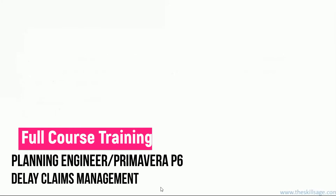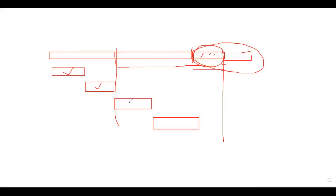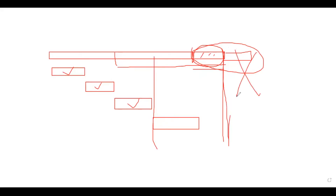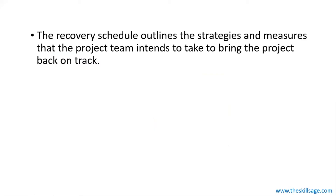Here we go back to the whiteboard for the recovery plan scenario. In this scenario, maybe you have completed some activities and you have a certain remaining timeline. In this timeline, the work is achievable. You can do a little rearranging of activities, apply more resources, use fast tracking or crashing, and you can achieve the target. This would fall under the recovery plan. The recovery schedule outlines the strategies and measures the project team intends to take to bring the project back on track. The team preparing the recovery plan must have full controlling and steering capability to bring the project to where it was supposed to be in the initial stage.